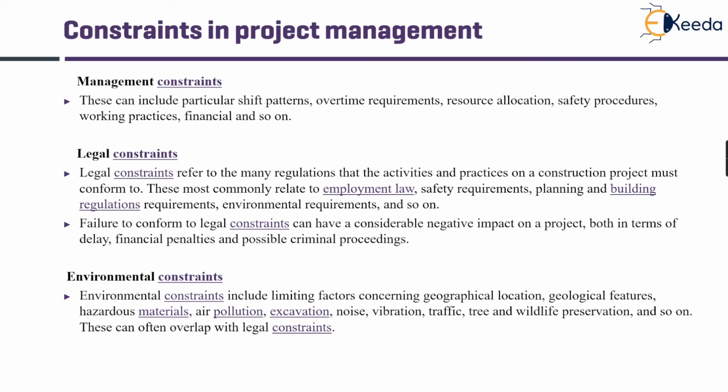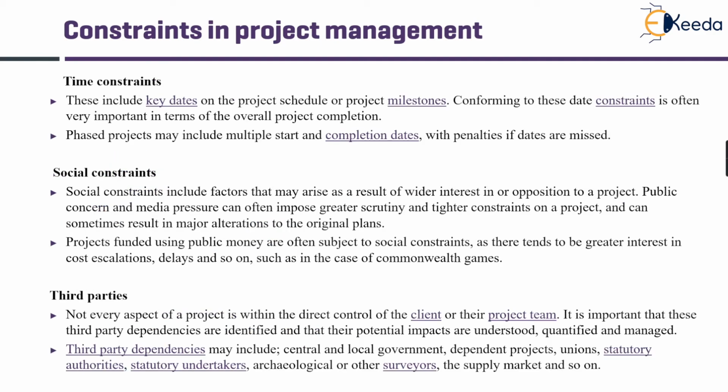There can also be environmental constraints, which is related to geographical locations, its geological features, hazardous materials in the area, air pollution, vibration, traffic, etc., which will overlap with your legal constraints, and you have to perform an analysis, the environmental impact analysis. Social constraints